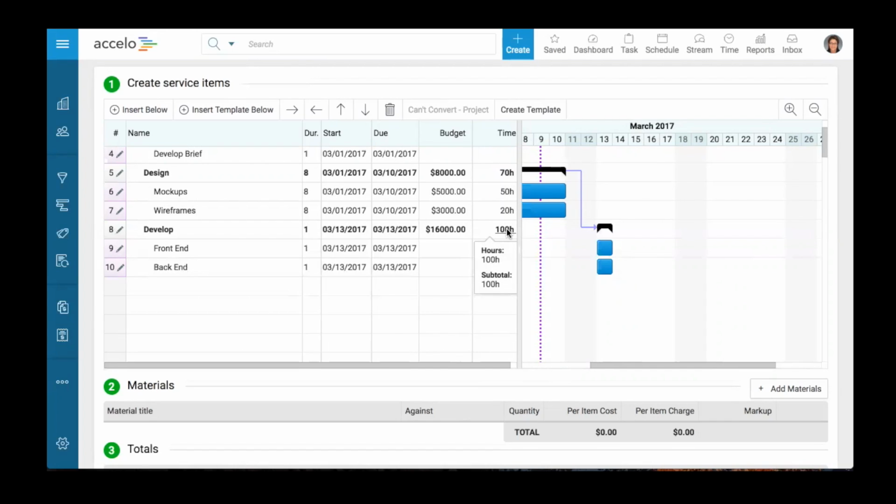And the reason that we're doing this is we don't know what other features we want to develop, any QA or testing that needs to be done. You can think of this also as if you're delivering on a much larger report and you don't know what the pieces are of the report that you're going to write. We can keep this really big block of time. And then as we get more clarity, as we're managing the project, we can be really flexible and agile in carving out that time.